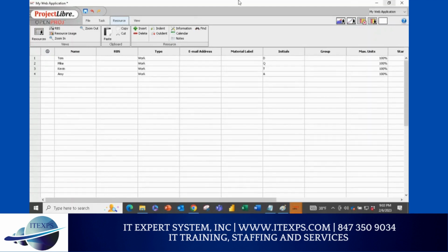Both practices are fine. If I use the names, then I'll put 100% because I'll not put 200%. If you have some agreement that one person is going to work overtime, then you might consider 120%, 130% like that. If you know that this person is only available 50%, then you can specify 50% here. Make sense or not? Sometimes a Scrum Master may be 50% on the project. Then you can associate a unit of 50%. Good so far?